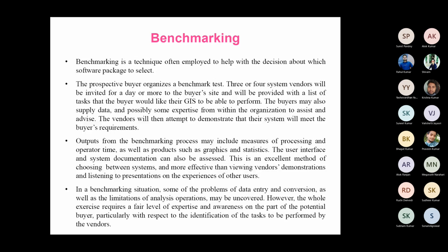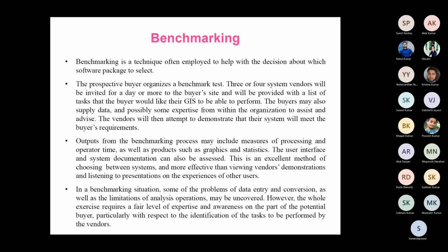And then the user or the buyer will supply their own data on which they want to execute the analysis. And the vendor will demonstrate this whole analysis on their own system by showing their own software using the buyer's data. They will demonstrate the analysis on their own system. So this is the benchmarking process. With the help of benchmarking, the comparison could be done.